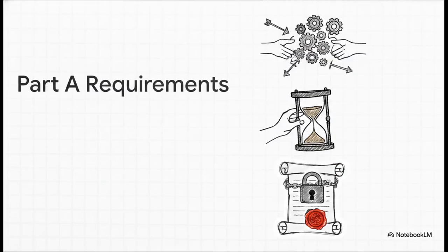So what does Part A actually look like in practice? Well, first, you've got to correct any out-of-sequence logic, then adjust your remaining durations so they make sense for the actual work left to do. You'll apply any global change rules necessary, meaning those bulk updates to constraints or calendars across the entire project. And crucially, I absolutely cannot stress this enough, you must obtain formal sign-off and approval. Remember, a baseline is an official, locked snapshot. It is your committed plan. You should never, ever change a baseline without formal change control and stakeholder approval.